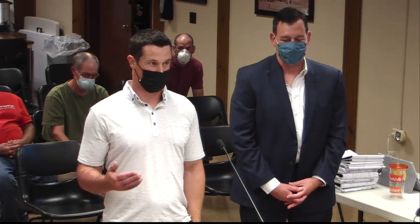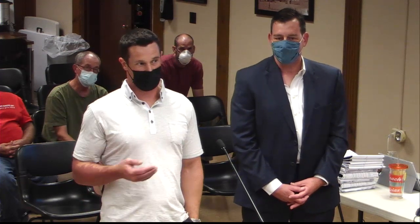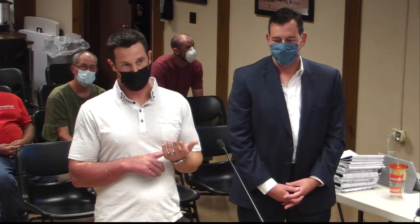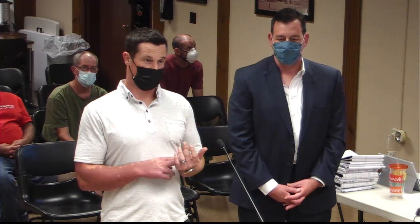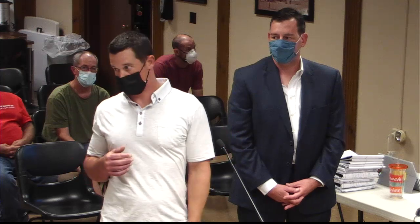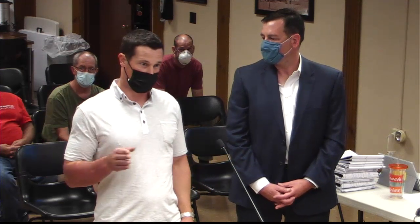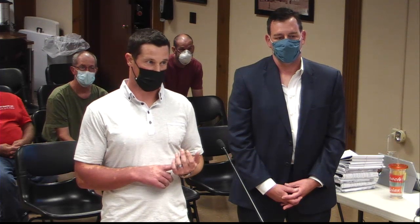But I think it is really exciting what you guys have done with the solar ordinance this past year, and we've been tracking it very closely. Also, unlike the previous solar project, we have obtained our utility interconnection approval for a 21-acre solar farm with Con Edison. We've secured everything we need for our NYSERDA rebate, and we have completed most of our engineering to this point, with the exception of a SWPPP, but we are meeting with conservation on the 18th, coming up shortly.